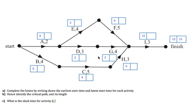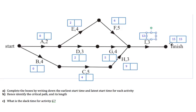We've just finished the forward scan and worked out our earliest start times for each activity, giving an overall completion time of 15. Now we're going to work backwards to figure out the latest starting time, which is the second number for each activity. Working backwards involves subtractions. For Activity I, if it takes three to finish, then in order to complete the project by 15, it must start at 12. So the latest start time for Activity I is 12.